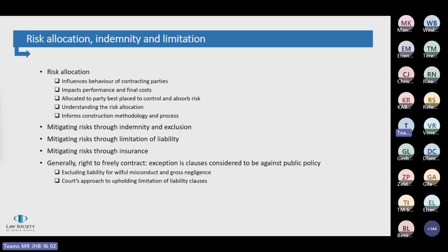The limitation of liability would be enforceable against the contractor for any work done by subcontractors and employees, insofar as they directly subcontracted and the scope of work is included in the scope of work under the main contract to which the limitation of liability is applicable. But, and we'll talk about this when we deal with subcontracting, it is still important for a contractor where he wants to transfer these types of limitation and exclusion clauses to properly deal with those in the subcontracts.